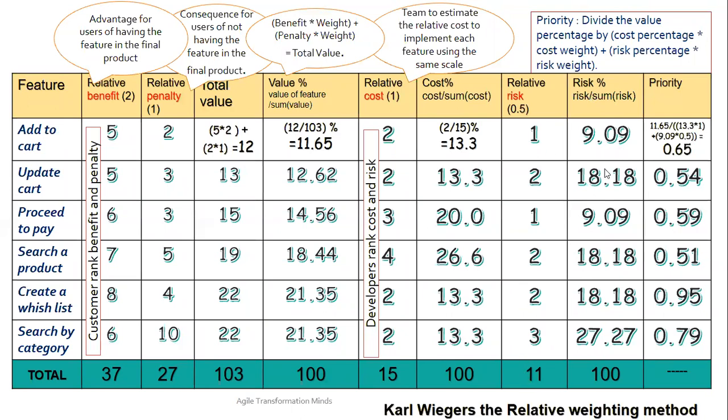That gives you 9.9. Now again, your team or your scrum master or your project manager can do an analysis based on risk, cost and value, which means that in order to deliver 21% value, there is a 27% risk and 30% cost. So you can do some math on your own based on your product and come to some conclusion like this is risk here, this can be avoided.